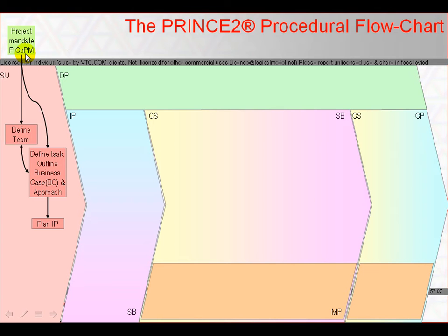The initiation stage enables the project board to answer the question, is it okay to go ahead and prepare the description of the project's business justification? We estimate it will take this much effort, this much time to properly answer how attractive and achievable are the project's objectives and desired outcomes. The question is asked at directing a project activity, authorize initiation. That's chapter 13, section 4, activity 1, or 13.4.1, or DP1. If approved, the initiation stage starts.